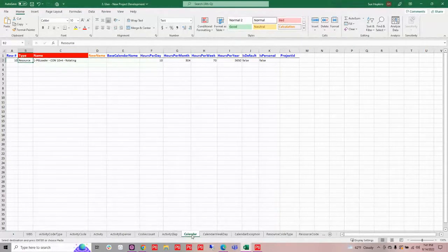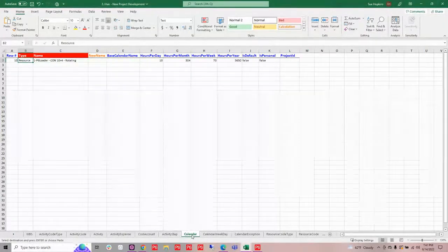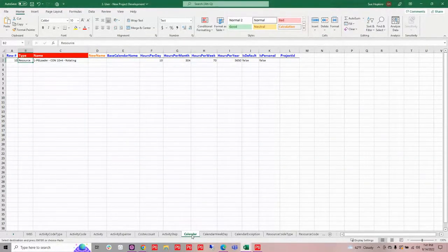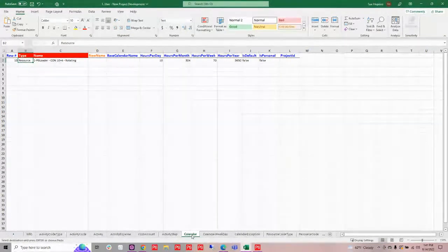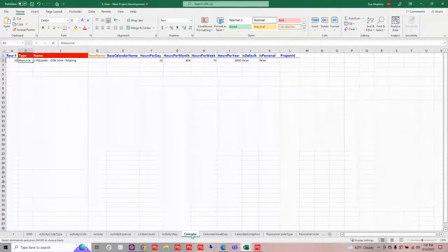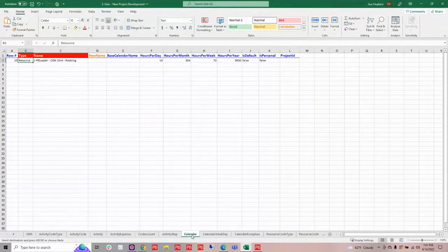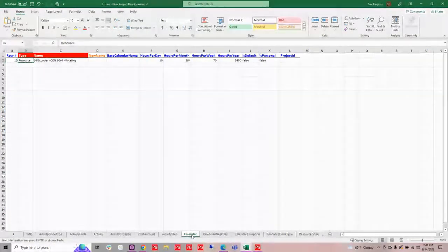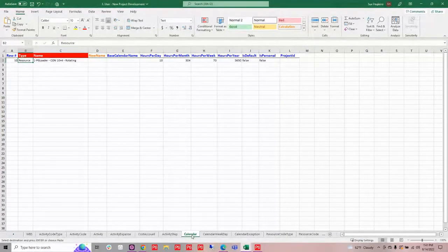The problem with a calendar of this nature is that when you are setting it up in P6, you're needing to count and click those boxes and set up what type of time it is. And if you miscount, it can be very hard to get that straightened out. And sometimes you don't even realize that you've miscounted. And so your calendar gets messed up, so to speak.